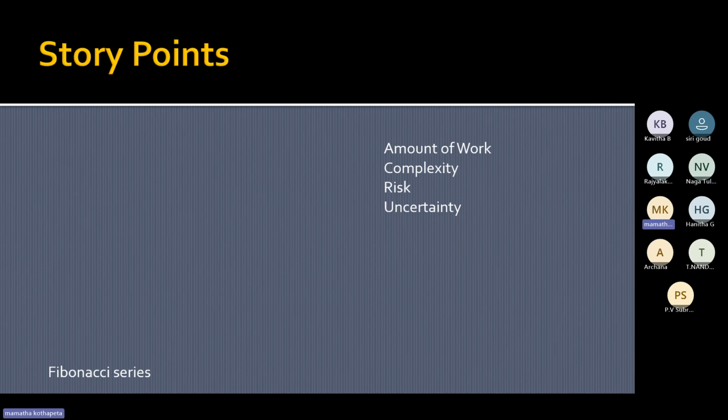Now they'll open all the 10 requirements. Requirement number 1, they'll pick up and discuss. The first point is the amount of work. That particular requirement needs a lot of work, a lot of analysis, heavy work, and contacting multiple people. So they'll give some points for each parameter on the screen.